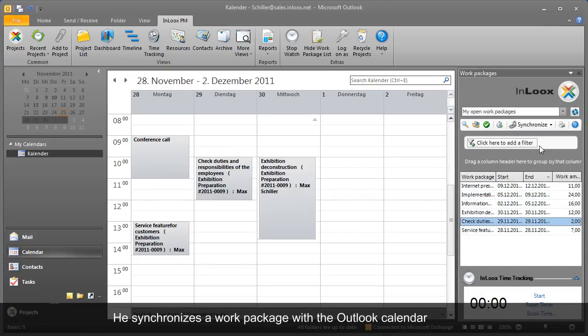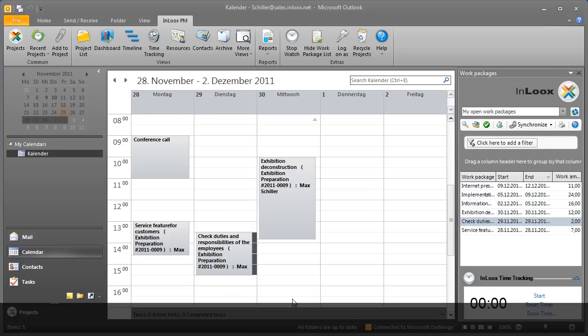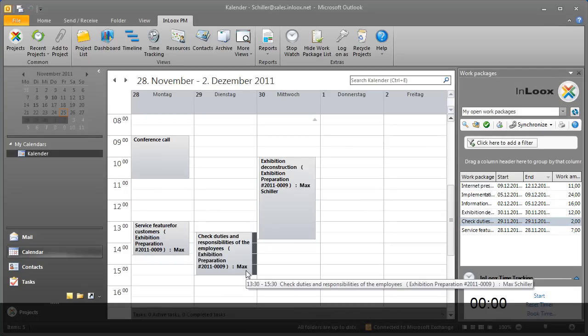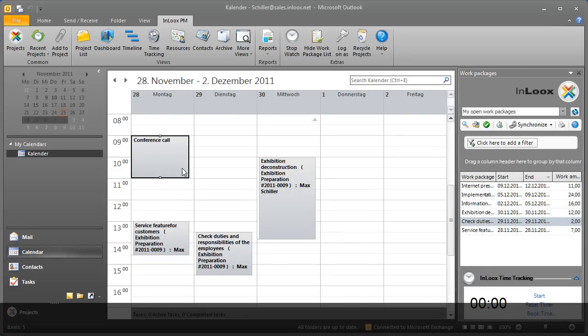InLooks PM supports personal time management directly in Outlook. When a work package in the project schedule is changed, InLooks PM immediately updates Max's calendar. Everybody involved is automatically kept up to date at all times.